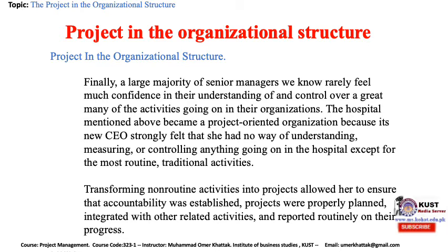Whether an organization is conducting a few occasional projects or is fully project oriented and carrying on scores of projects at any time, when a project is initiated, three organizational issues immediately arise. First, a decision must be made about how to tie the project to the parent firm. Second, a decision must be made about how to organize the project itself. Third, a decision must be made about how to organize the activities that are common to other projects.